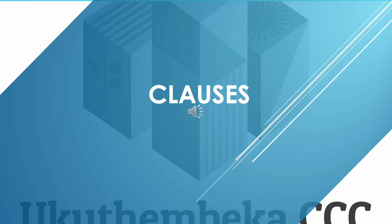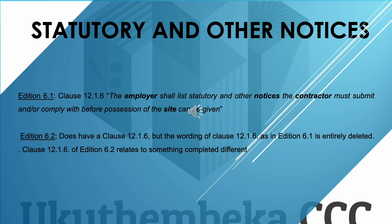Looking at two clauses that disappeared completely in Edition 6.2: the first deals with the employer identifying services connections. Edition 6.1, clause 12.1.5, read: 'the employer shall identify access to water, sewer, storm water, and/or electricity connections to the site.' In Edition 6.2, clause 12.1.5 exists but its wording relates to something completely different — the Edition 6.1 wording on services connections is entirely deleted.